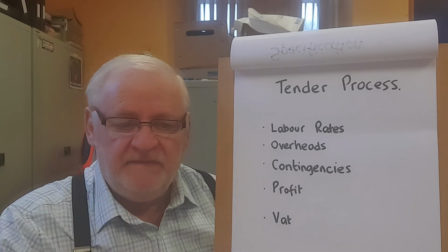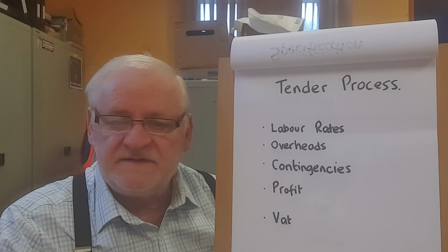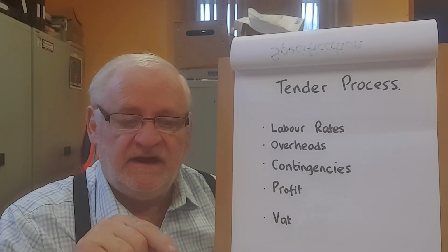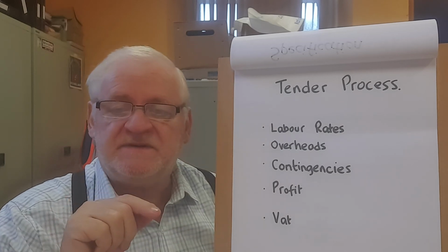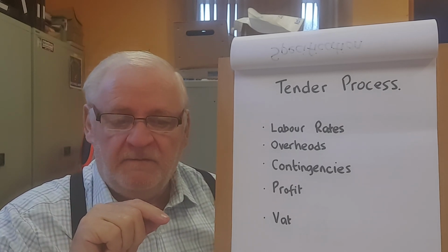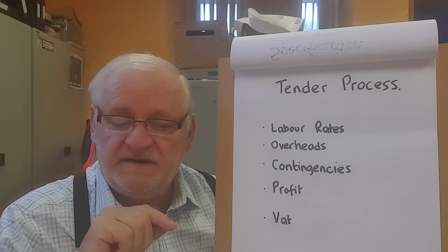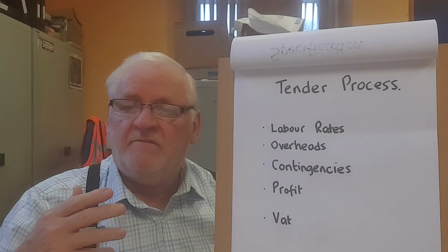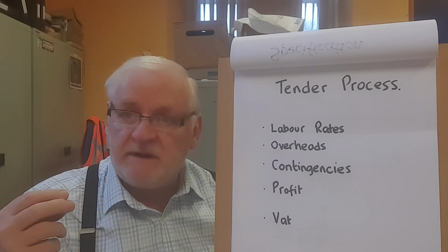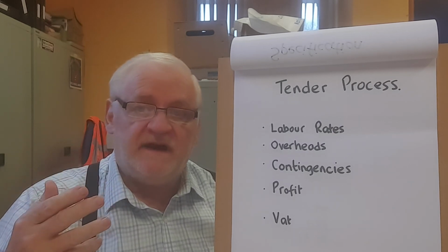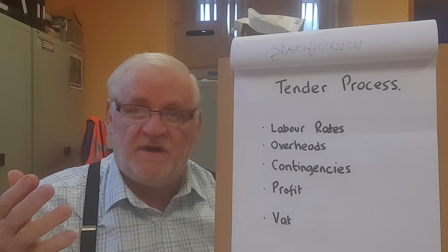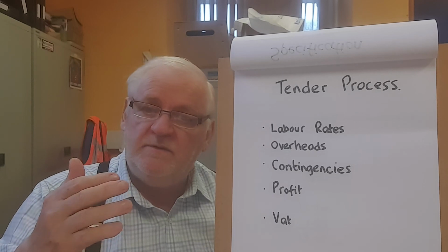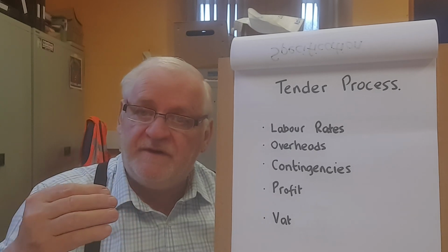And then lastly, when working out pricing for people, it's very important at a very early stage to begin sourcing the suppliers. Now, sometimes there are preferred suppliers. Sometimes there are people that you've worked with in the past who are preferred people, the people that you would like to be going to, and you'd need to contact them and say, listen, I'm pricing for some work. Maybe I'm pricing for a load of windows to be done. And I want to know, will you be able to be my preferred supplier?